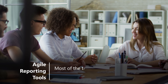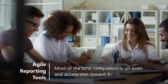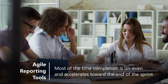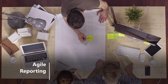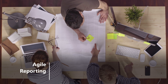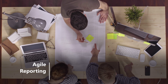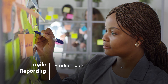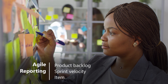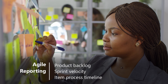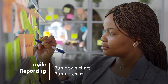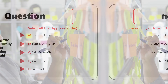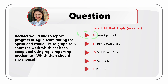Jumping to 75, which tells us that most of the time completion is uneven and accelerates toward the end of the sprint. There are several Agile reporting mechanisms to show progress and share updates with stakeholders. They are product backlog, sprint velocity, item process timeline, burn-down chart, as well as the burn-up chart. So the correct answer is Choice A: Burn-up chart.